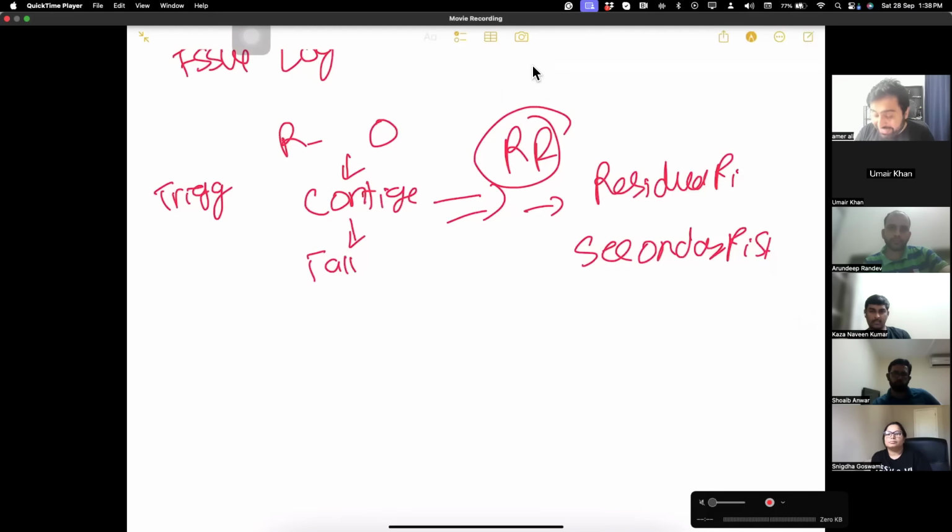One more time: anything which you identified before happening and made a plan for, you put in the risk register. Throughout the project, you identify risks and put them in the risk register. That's a continuous effort. You don't need a change request for that. If any plan is affected later on when you're making a risk response, then you handle it that way.